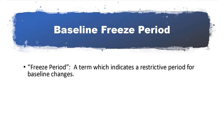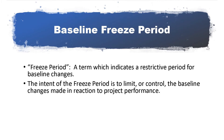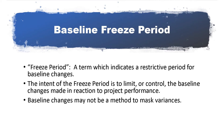The definition of freeze period is a restrictive period for baseline changes. The intent of the freeze period is to limit or control the baseline changes made in reaction to project performance, and to motivate a more forward-focused change control system. Baseline changes are highly restricted during the freeze period to maintain a stable and measurable work plan for ongoing work. In other words, the freeze period limits the ability to adjust the budget time phasing based on actual performance in order to mask variances.